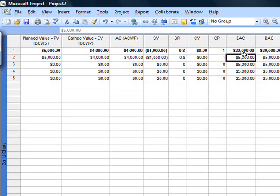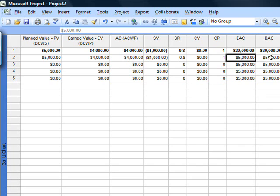The estimate at completion is an important number in controlling cost. It will become the estimated cost at the end using the CPI, the cost performance index.